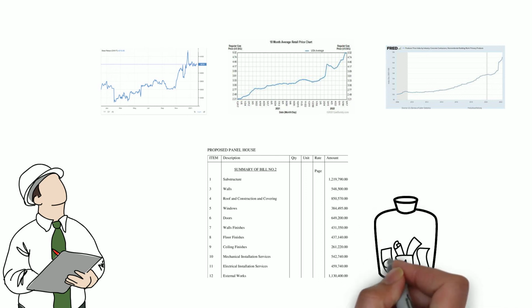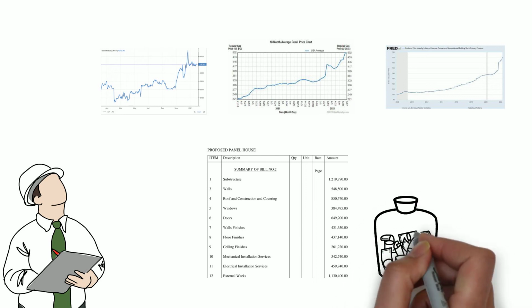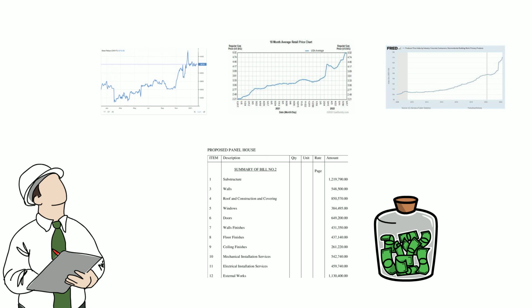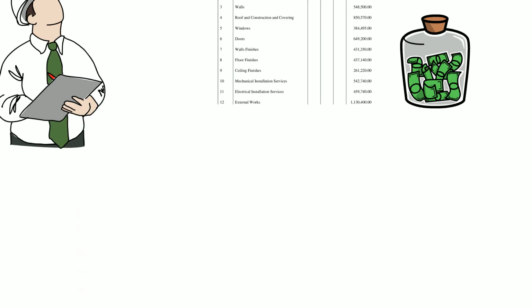This results in a higher tender cost. And this isn't just one contractor, but every contractor. So now, clients are comparing inflated tenders with inflated tenders. And to combat this, they may choose to take some or all of the future inflation risk with the fluctuation provision mechanism. This then results in an initial lower tender cost.